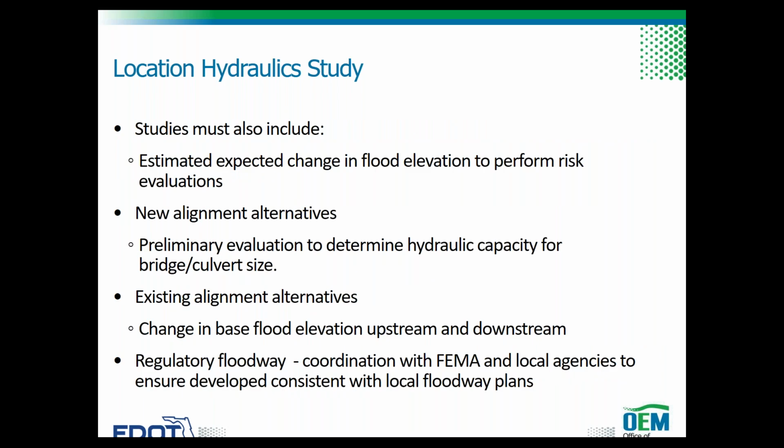Every wetland and cross drain has an associated floodplain. However, it is not necessary to evaluate the hydraulic impact of each one. The impacts to flood elevations and limits are minimized by designing cross-drain facilities in accordance with the FDOT Drainage Manual. Only those alternatives or design features that may create substantial differences in flood elevations and limits should be evaluated. The expected change in flood elevations due to the project must be estimated to perform the appropriate level of risk evaluation.